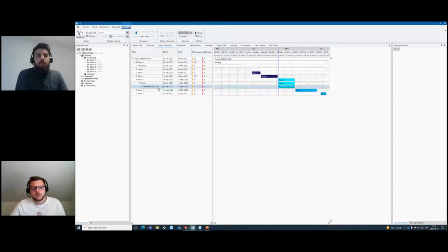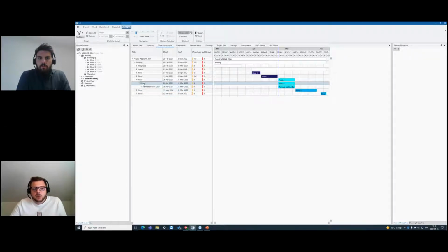So for me as a site manager, I don't really care about when the drawing is ready and when the production is ready. It's more when the delivery and erection is done. And in my case, in the project, the site is very close to the factory. So erection date and delivery date are the same. So that's why I'm not showing delivery date, but it might also be a good idea to show delivery date. It's up to you as a user, of course.